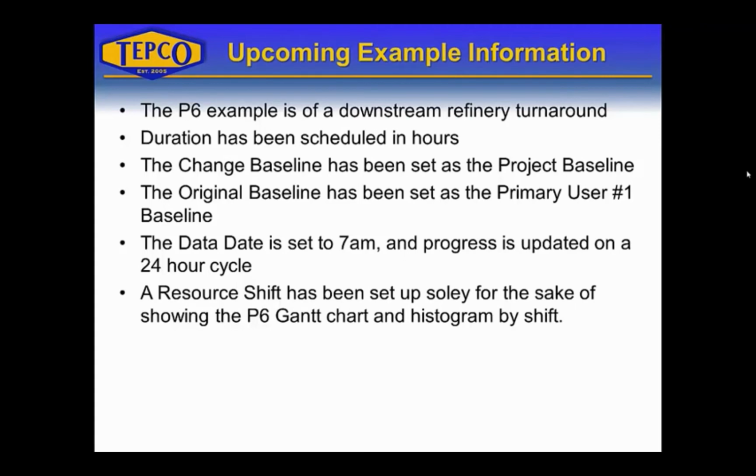The change baseline has been set as the project baseline, so it's basically set as the main project baseline. The original baseline has been set as the primary user number 1 baseline. This way we have both the change baseline and the original baseline attached to the schedule.